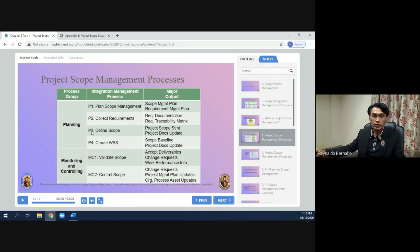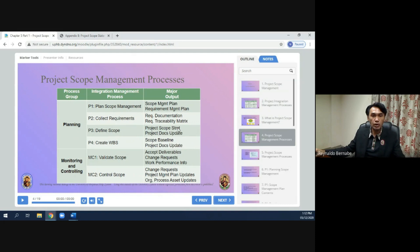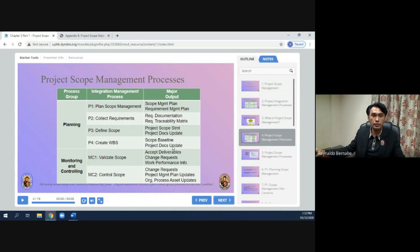The third phase in planning is define scope, and the output is the project scope statement and project document updates. The fourth phase is create WBS, and the output of that is the scope baseline and project document updates.